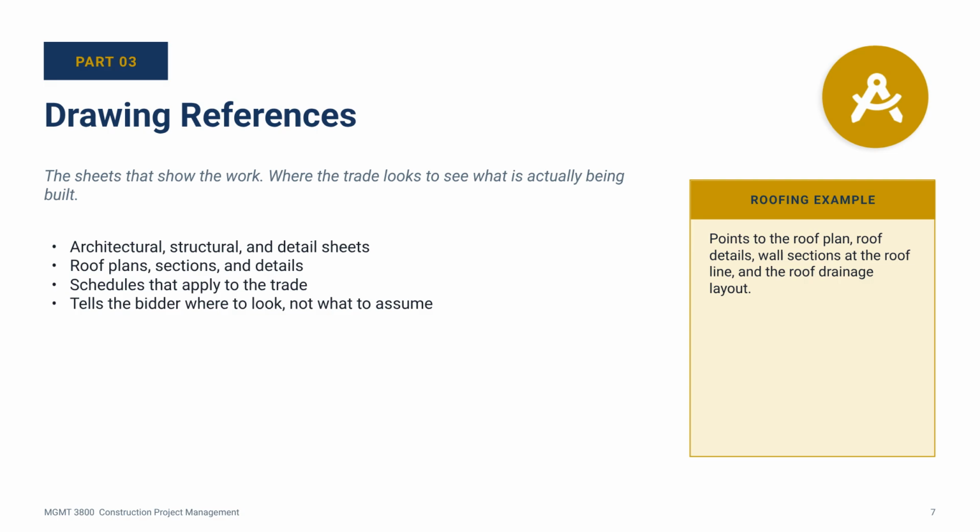The thing to notice here is that the scope is doing a lot of pointing. It points at specs, it points at drawings. The actual technical content lives somewhere else. The scope's job is to tell the contractor where to look and to assign responsibility for what they find there.